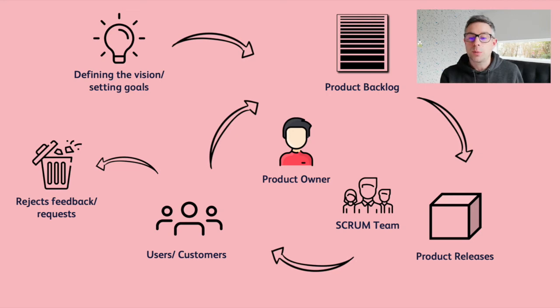And the other thing that the product owner might do at that point is to run a product demo, so a review session with stakeholders and business owners, people who have an interest in that product and the value that that product will deliver. So the session might be a showcase of the work that the team have done so far, and that's an opportunity for people across the business to give their feedback, to say that's exactly what we expected, or perhaps what have you thought about it this way, or have you thought about we might want this